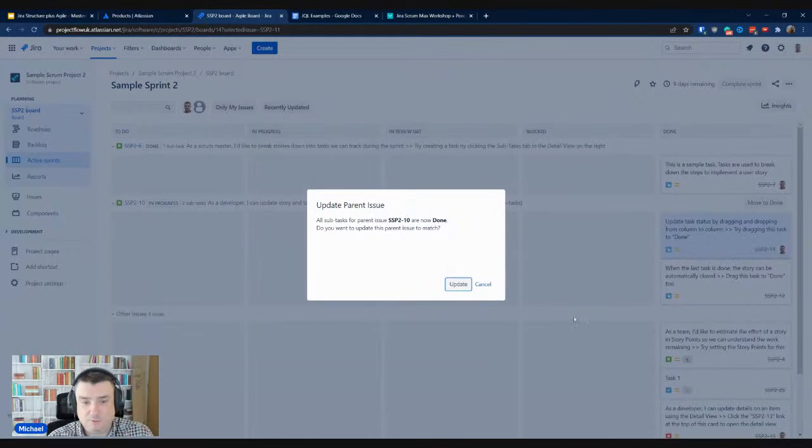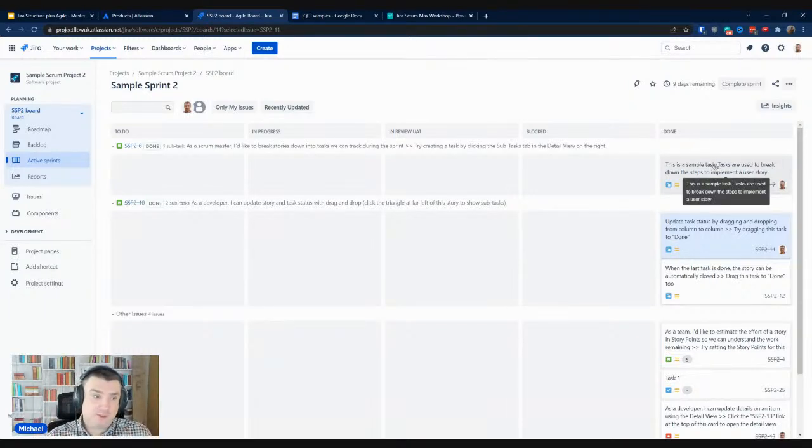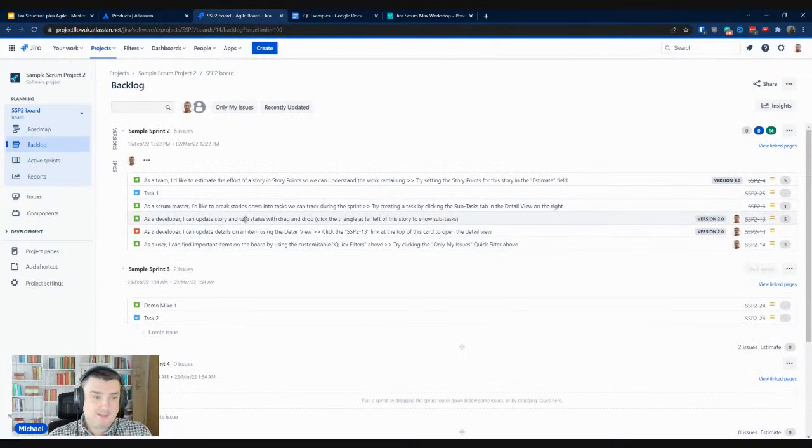Yeah, and we still have, let's say, not 9 days, but like 5 days. So I can tell you, that depends on the Scrum Master, because you can complete the sprint. Of course, there will be no problem. But regarding Agile methodology, the Scrum Master should talk to the product owner, say that we still have, for instance, 3 days, the sprint is not completed, we've got capacity, and the product owner should actually say, okay, so let's sit down, go to the backlog, and let's add more tickets to the active sprint.